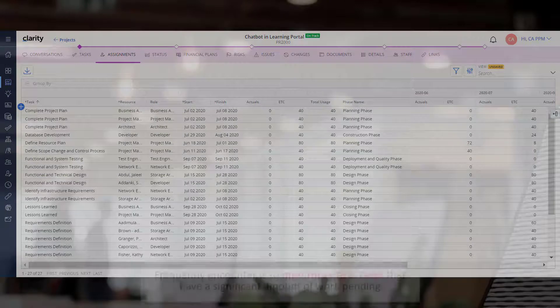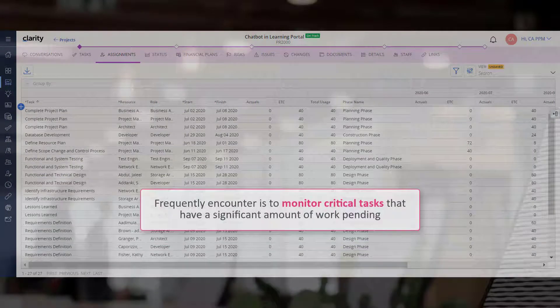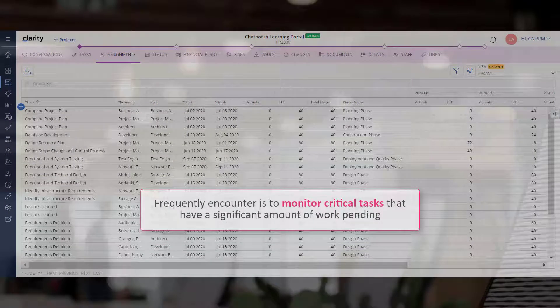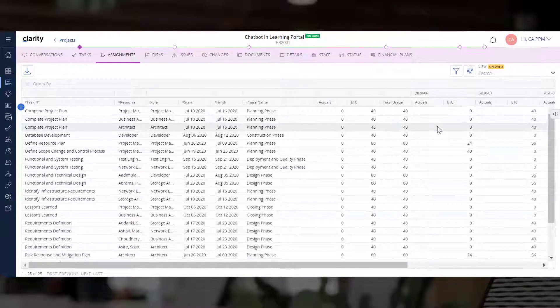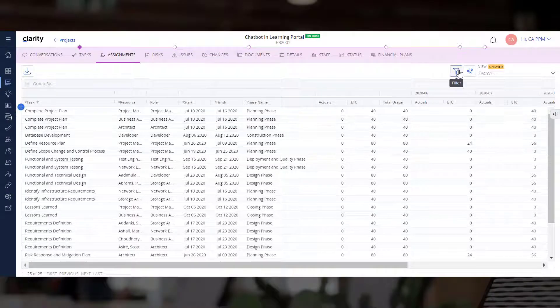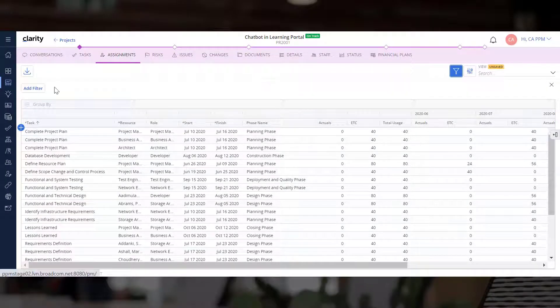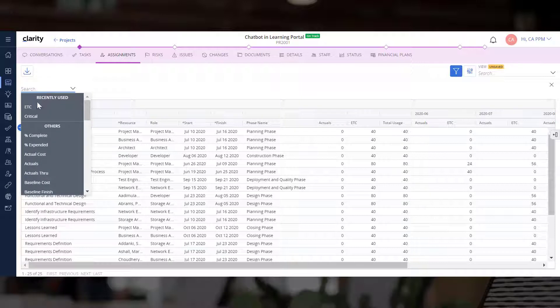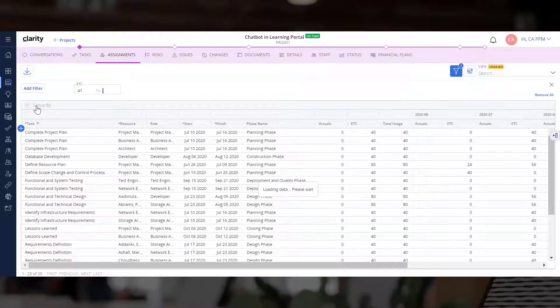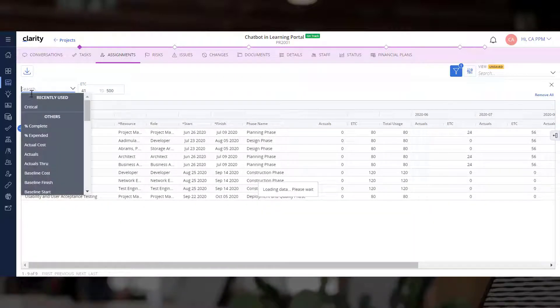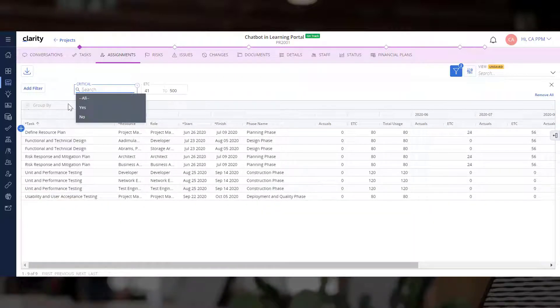Another use case project managers frequently encounter is to monitor critical tasks that have a significant amount of work pending. Let's use the Filter attribute to identify critical tasks where the estimated time of completion is more than 40 hours.